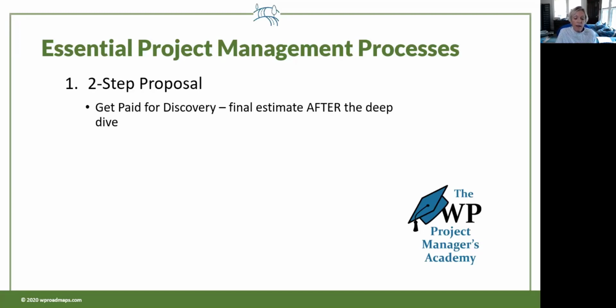So you need to have a plan for dealing with issues before the project starts, because that means smoother sailing on your project because everybody knows what to expect when an issue arises. Who does it go to first? How does this get escalated? Who talks to the client? That sort of thing when it comes to issues. Or who doesn't talk to the client. Sometimes that's the best way.